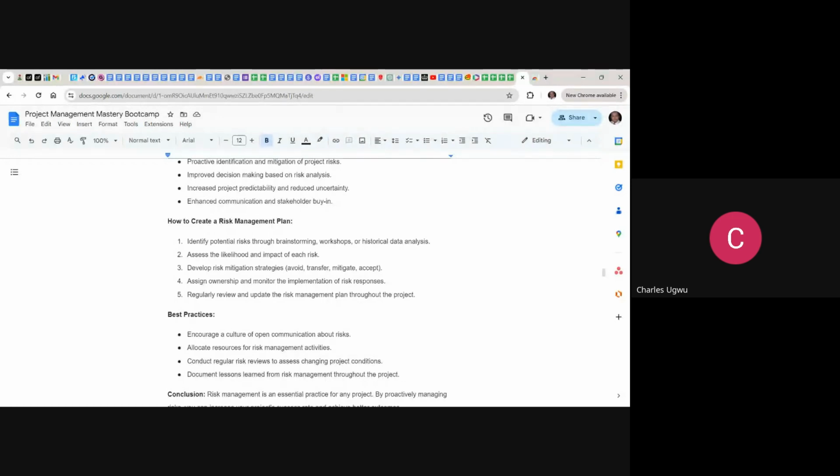That's a good time. So if you are meeting on Saturday, is it a rainy season? Is it going to rain? Is it going to be an open event or a closed event? If it's going to be an outdoor open event, what is the probability of raining that day? That can be a risk if it's an outdoor event. When it rains, everything is messed up. So how do we identify such a risk and make sure that we have a mitigation plan against all those things? I just use rain as an example.